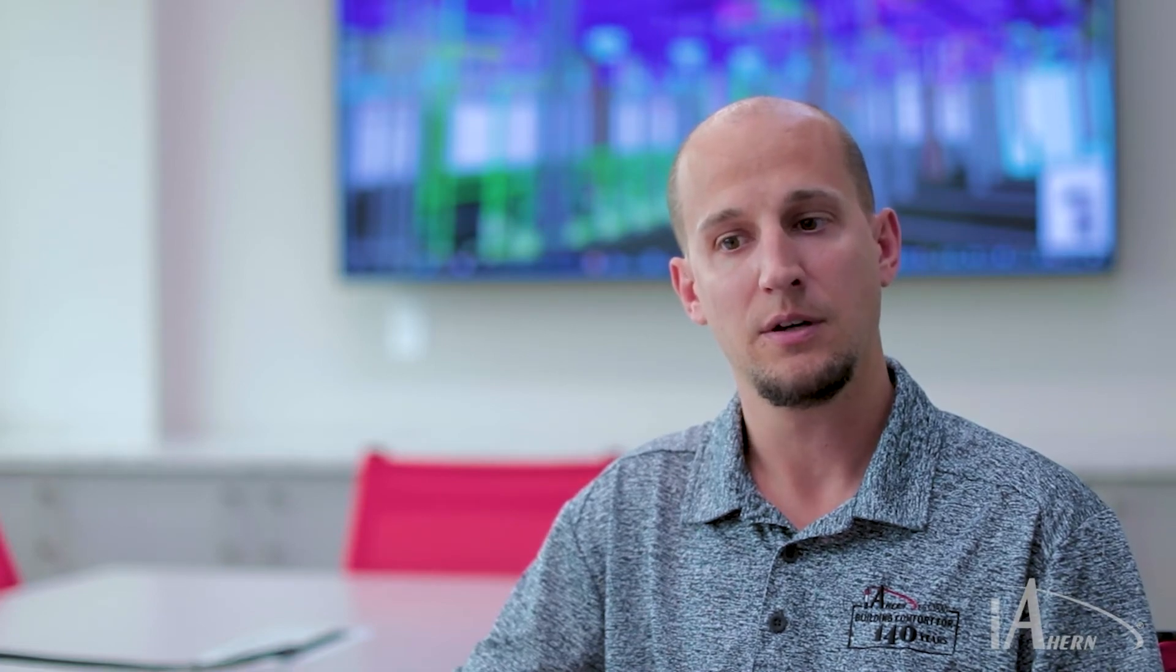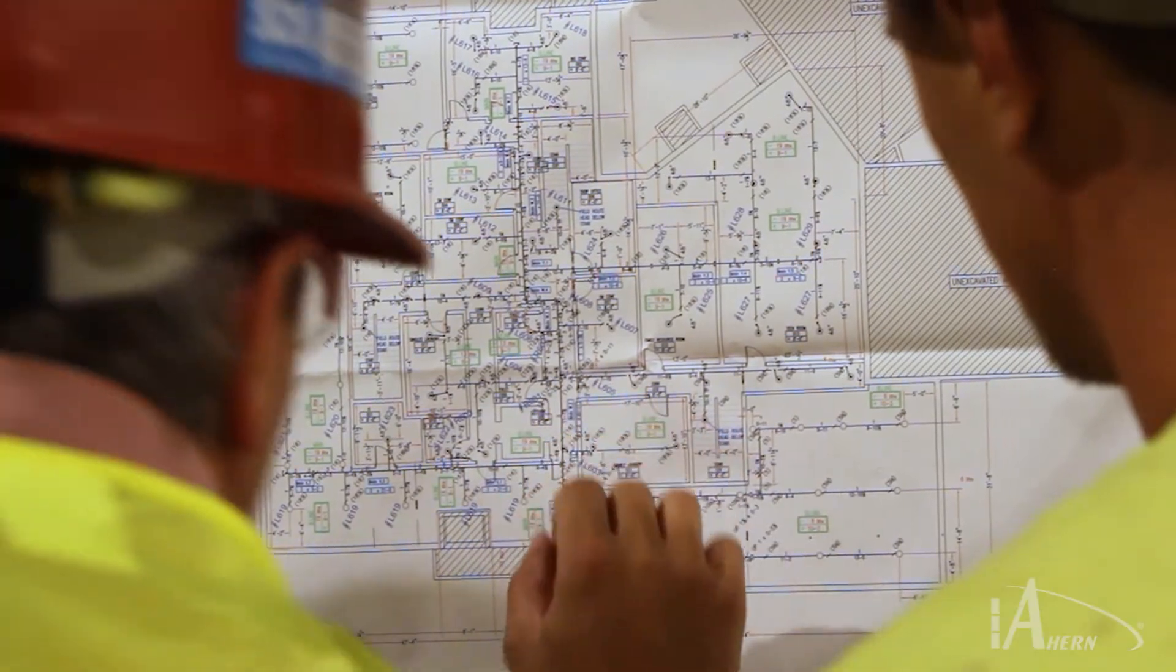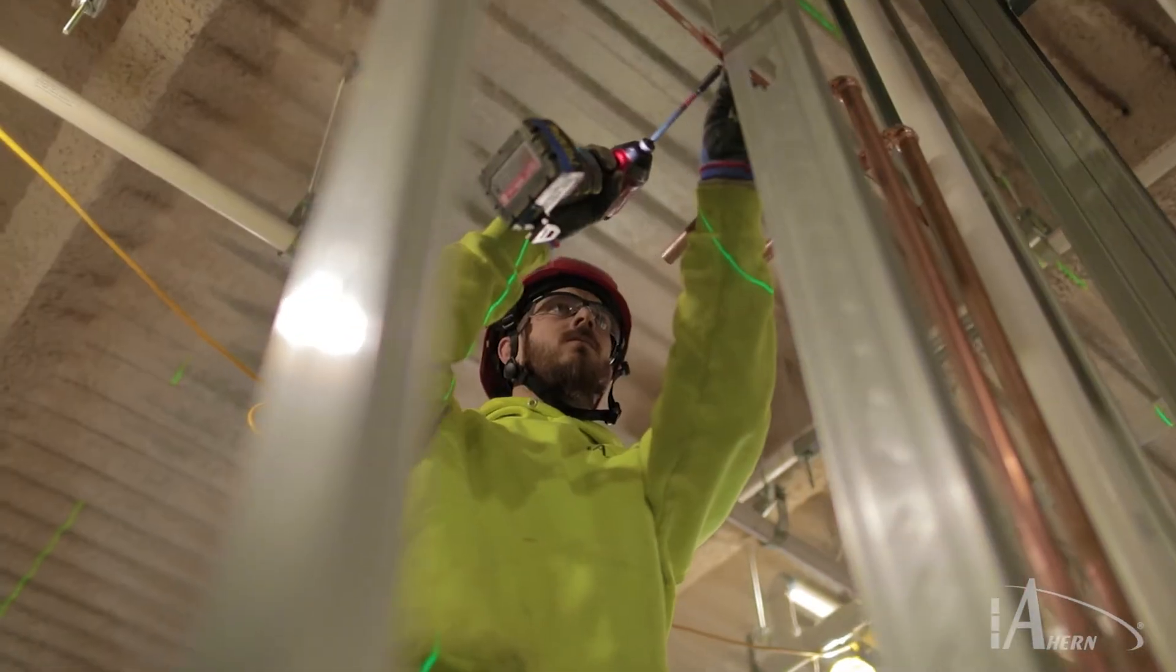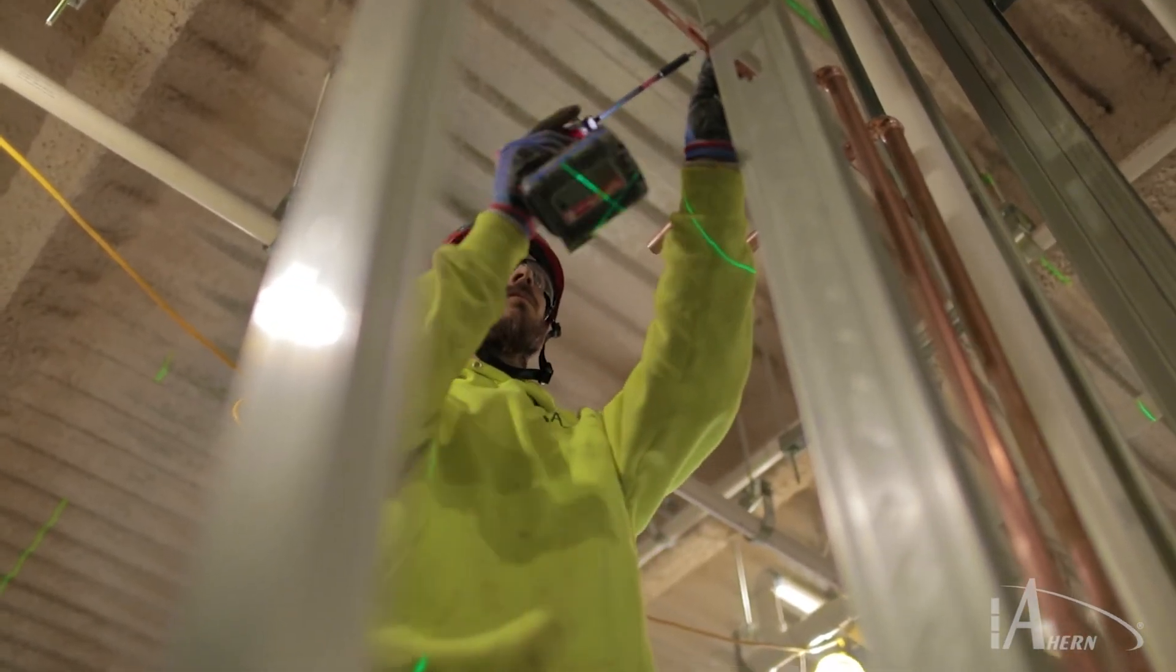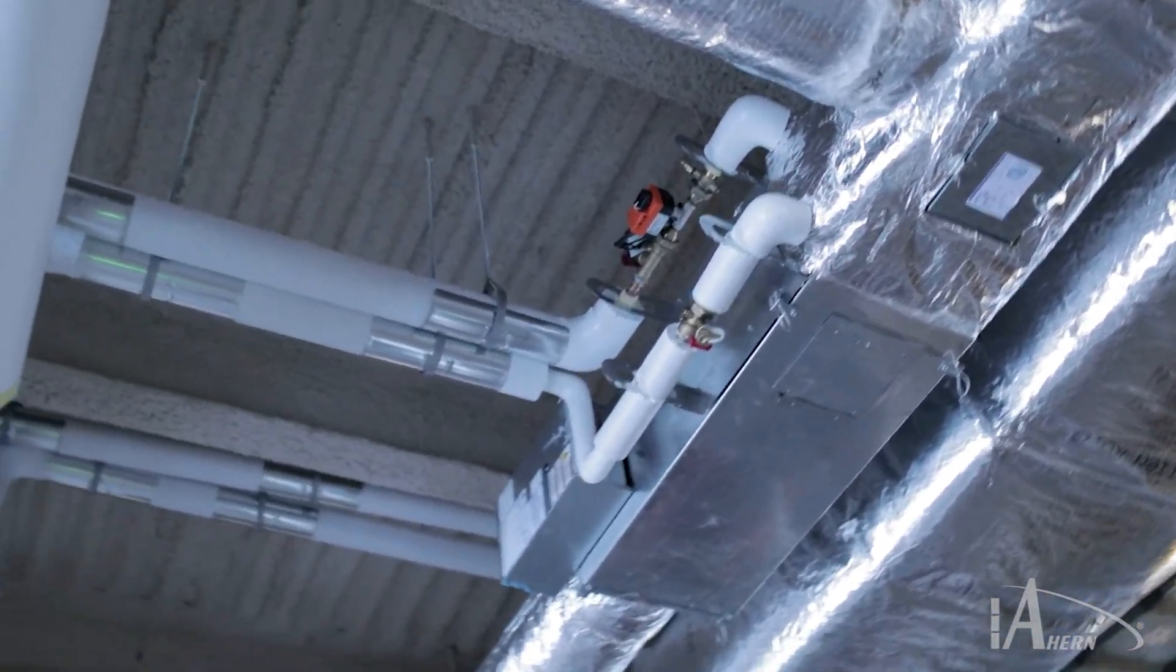One of the largest advantages of utilizing BIM software to do the coordination and modeling stages is that it allows the offsetting of some of the field schedule as a result. The field can have less man hours on site. You can offset some of that with the shop settings. The shop can be fabricating portions of the building well before the field will be able to install it.